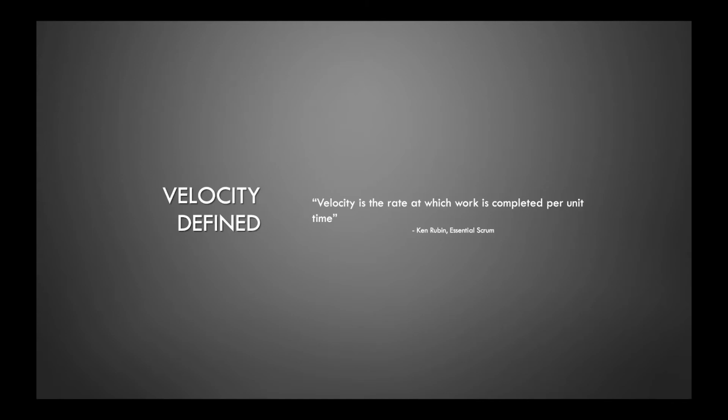Instead, it simply states that the more the developers know about their past performance, their upcoming capacity, and their definition of done, the more confident they will be in their sprint forecasts. For example, cycle time is an example of an alternative to velocity for measuring past performance. Cycle time measures the amount of time a team works in order to complete a product backlog item.